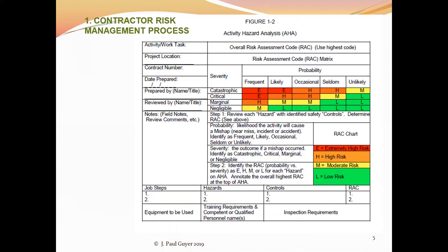So this is your judgment of the combined risk of the hazard occurring, and then the severity of it occurring. And this is completely a professional judgment on your part. Now, a little bit earlier, I talked in terms of a point system, 1 to 10 for potential for the incident to occur, 1 to 10 for the severity of the injury if it does occur.